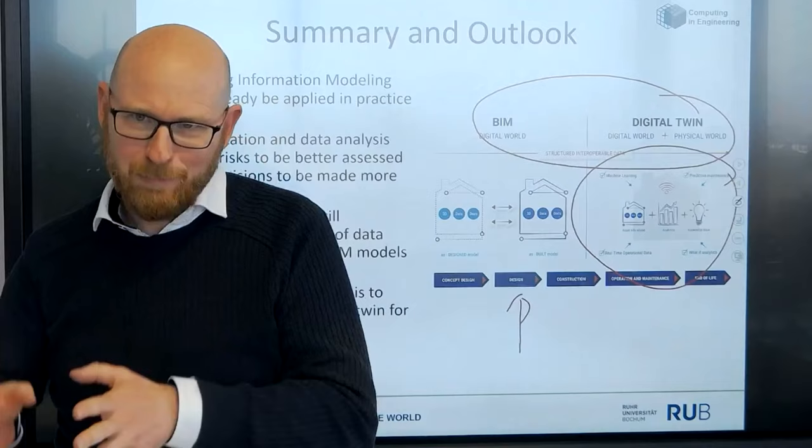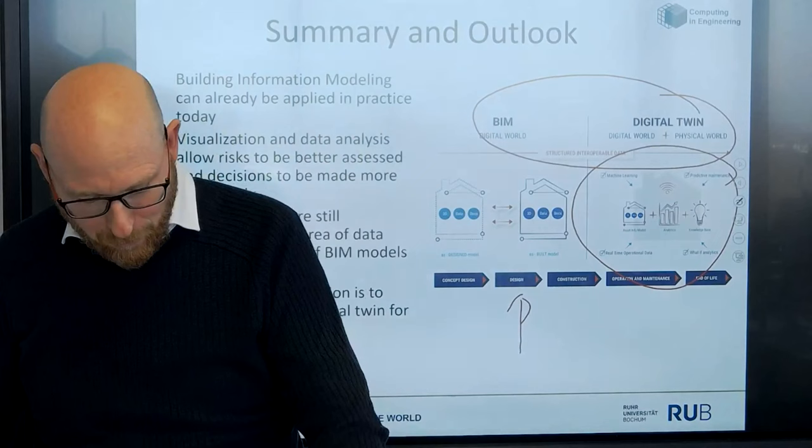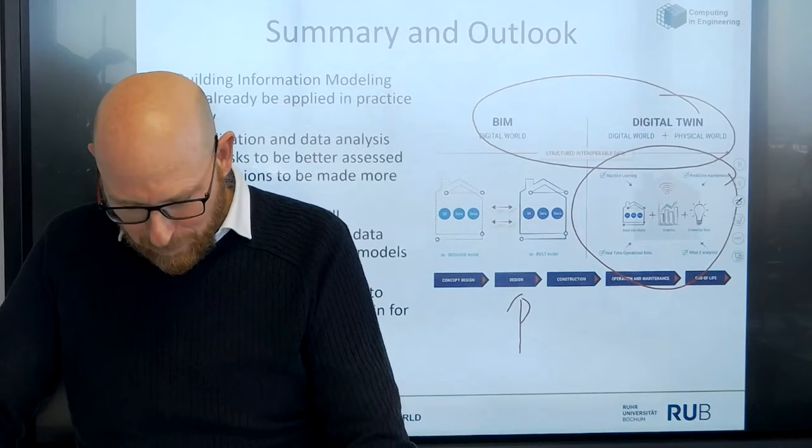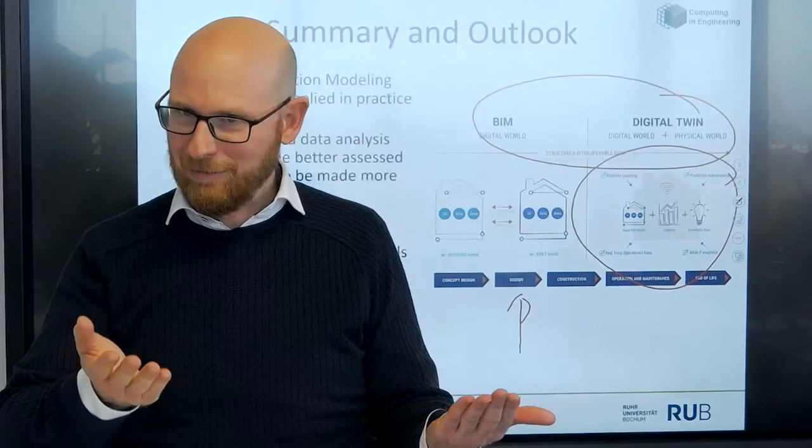Reliable information. Of course, you can put a lot of information in a conceptual phase, but it's not very valid. So what you can check is, we call this the quality of the model. There are tools available. In our platform, which we are developing for our country at the moment, you define the information requirements in a digital way, and you get some kind of rules to check it. Also, you can do an automatic quality check based on what is demanded.